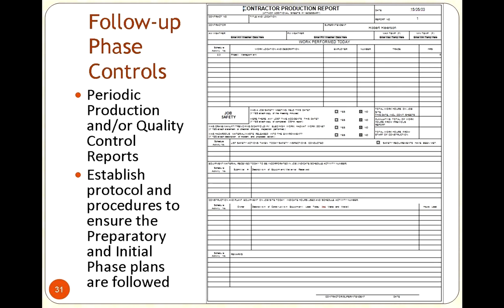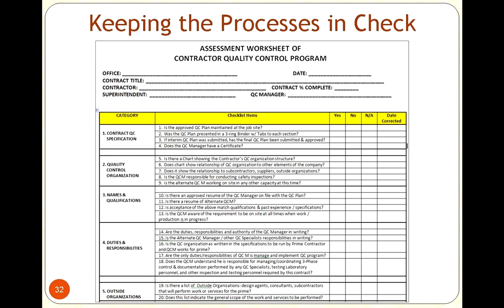And the thing that always struck me as a little odd in the beginning, but made sense later on down the road, is we actually put the weather information on that form too. So if someone said, well, we couldn't do this work because we had X amount of days of rain, I could take a look at this document, and because we were capturing that, I can say, yeah, they're right. It did rain that day. I forgot about that. For a short project, that's not relevant. But for a major project that takes weeks and months, that may become relevant, as it did with that particular project. So even the little things can really make a difference.